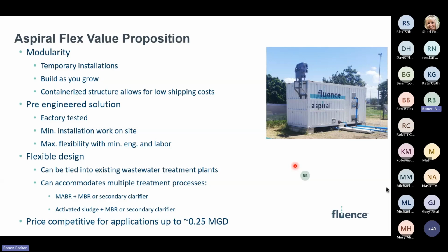That reduces the cost of labor, but also the amount of engineering that needs to be put into a project has been reduced significantly, because from our standpoint, we don't need to charge a lot for engineering because the design for these tanks is already done. Which means that if I have an application, for us to design something is very quick. We don't need to spend a lot of engineering hours. And then when we need to execute it, our builders, the people who actually manufacture these tanks, don't need to reinvent the wheel every time because they have drawings. Those drawings are generic, so it's very quick. And so for us to manufacture and engineer these solutions, we were able to reduce the amount of time we put into that, which is carried over to the end client because we don't need to charge as much for engineering as others who need to customize the solution every time.